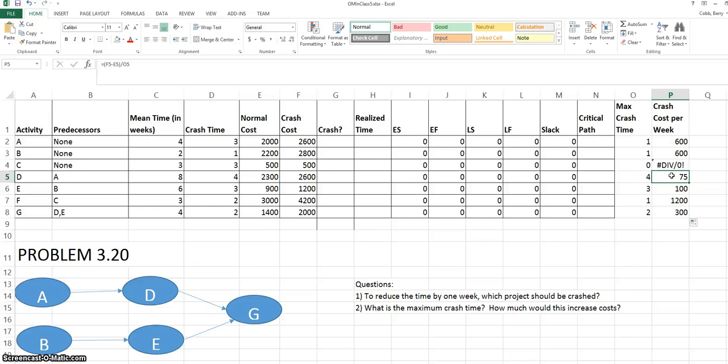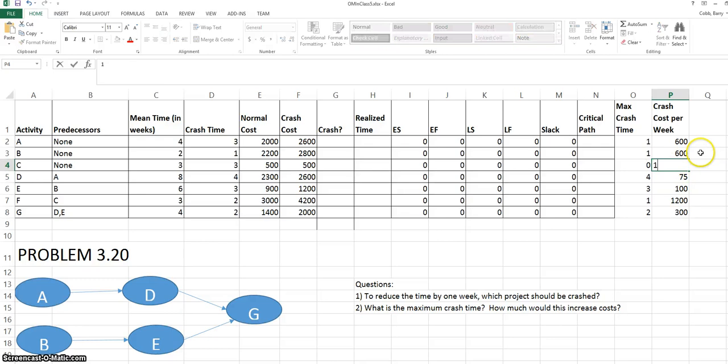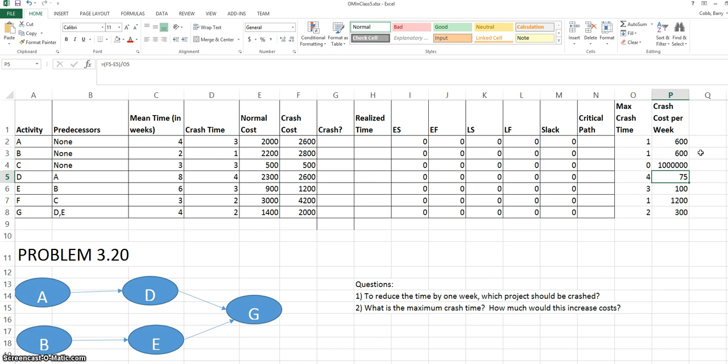We see one error in column B. Activity C cannot be crashed, so we can't calculate its crash cost per week. What we can do is just put an arbitrarily large number in that cell, and that will steer the solution away from crashing activity C.